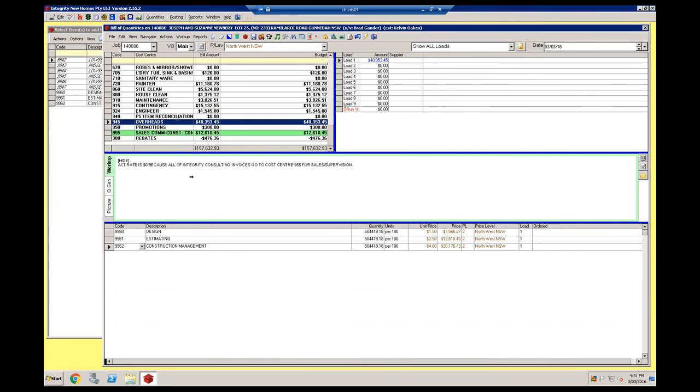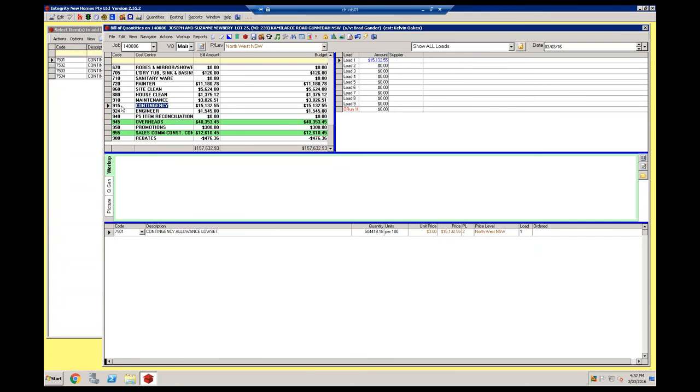Our overheads have been defined and calculated by our accountant and set up in our database, and it's saying for this contract amount, ex GST, this is the overheads or the running costs associated to generate that job, from a project management, estimating and design perspective. So contingency, once again, it's said this is how much we should keep aside for extra overs associated with travel or orders coming in over budget, difficulty getting trades.